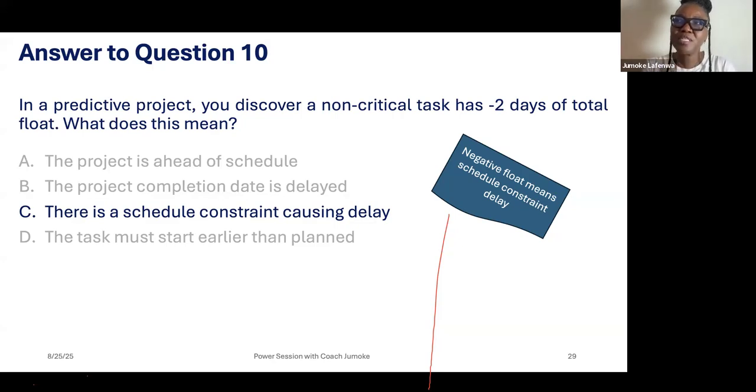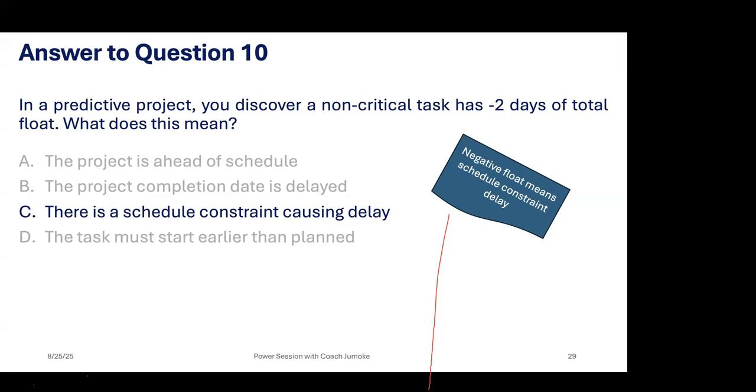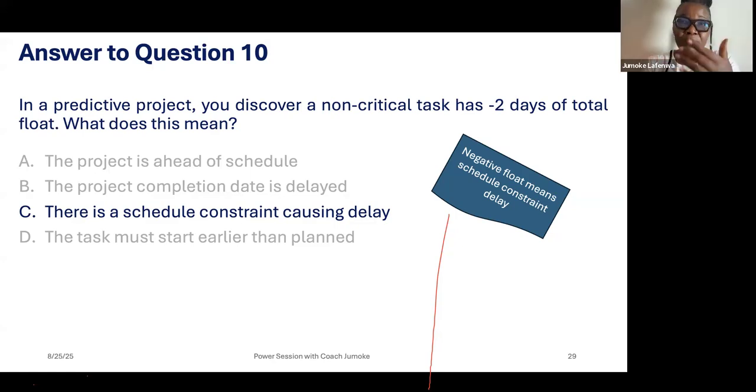So if the critical part was 12 days, at this point, it has increased to 14 days. Yes, so that is the schedule overrun. When you do your SV, the schedule variance, if you subtract earned value from PV and it is 0, it means what you plan and what you are doing is the same, so you are on track.